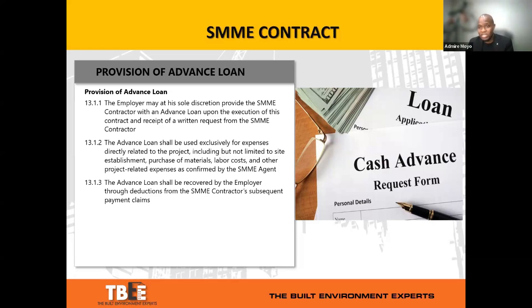We obviously know SMME contractors as well have an expectation. In most projects, you will get a point where an SMME contractor is appointed, and then they want to be paid their P's and G's upfront. And again, it relates to what I said initially, that most of the time they've borrowed money, they're under pressure, and so on. So here we've put it at the client's discretion. If the employer decides that they want to advance some money to the SMME contractor, then it's up to them to decide that.